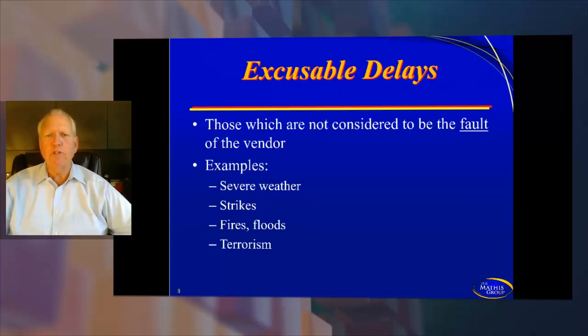Excusable delays, those which are not considered to be the fault of the vendor. So excusable could be severe weather, strikes, fires, floods, terrorism. I mean, think about what it would be like to have been in Washington, and maybe you were there during the time when all of that anthrax started showing up at all the government buildings. It didn't matter what kind of project you had. That building was evacuated, and evacuated for weeks, in some cases maybe even months, before it was actually cleaned up and fully available for you to come back in. So I don't care what project you were working on, that project probably saw many delays just because of those type of things. But there are excusable delays that happen on our project. Nobody wants it, nobody votes for it, but we kind of inherited it because of just the circumstances that we're in.